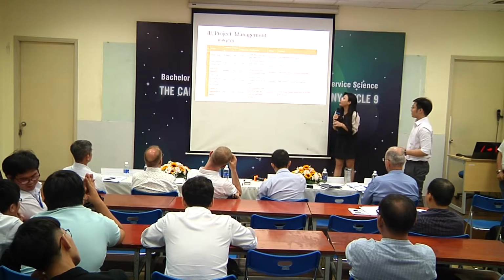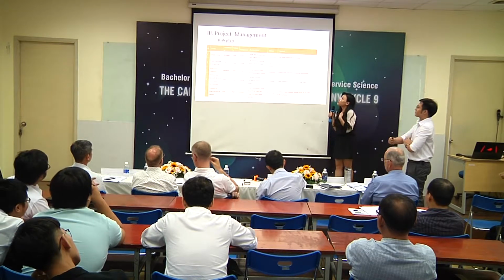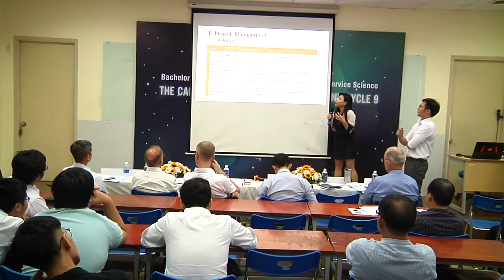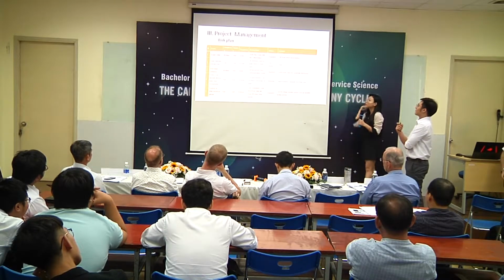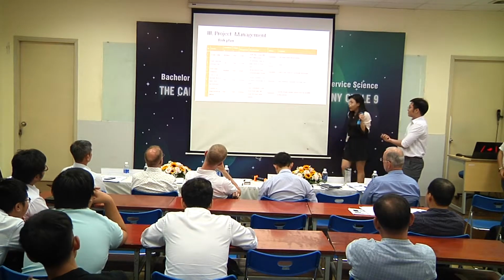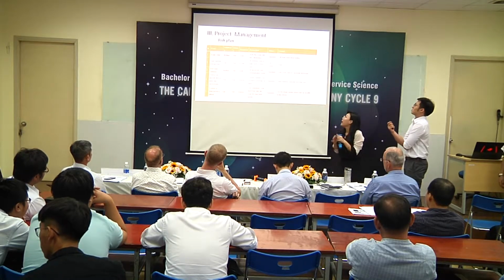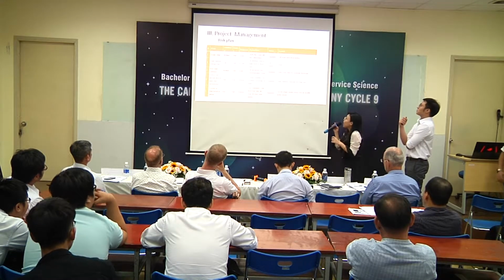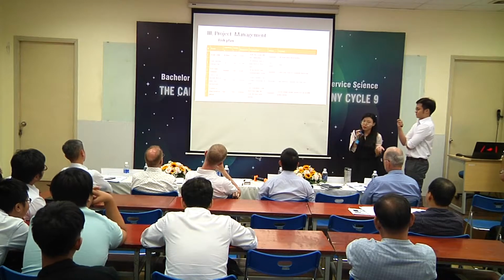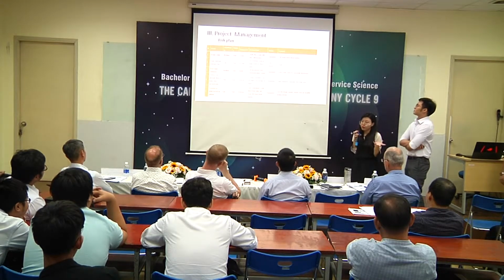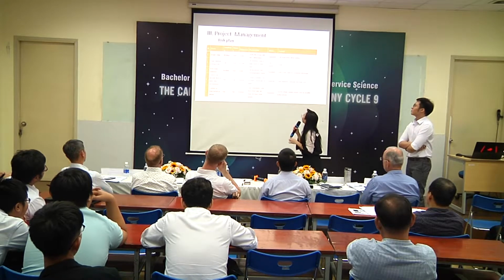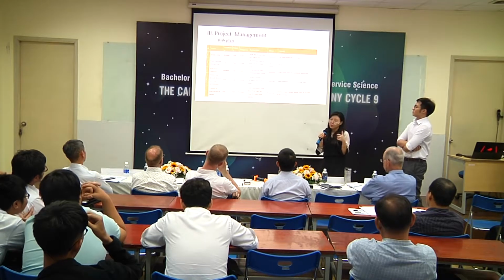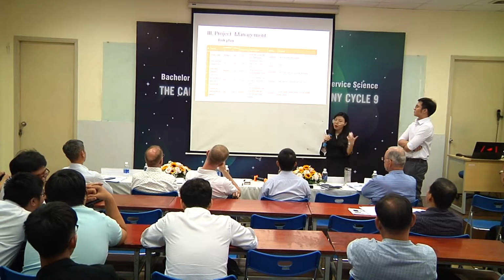So moving on to project management, here is our risk plan. About the first event, cost overrun, that has already happened. We shifted the cost from designing the new system to testing the current system, and we controlled that by self-studying more about testing.